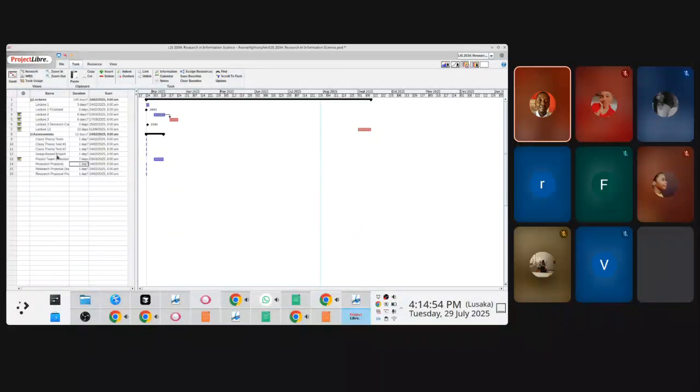You notice this thing here, right? The assessment activity summary task here, it's being adjusted accordingly based on the start date, the earliest date for the subtasks associated with it, and the latest end date in essence. So it's going to be adjusted for you automatically. Another one, what you do here is you start making necessary changes. Like for instance, in this particular case, I'll say, well, I have class theory test and class theory test. These are supposed to be under class theory test. So I'm going to indent these again, right? Under group project, all of these things here are under group-based project, like so. Do you understand this?